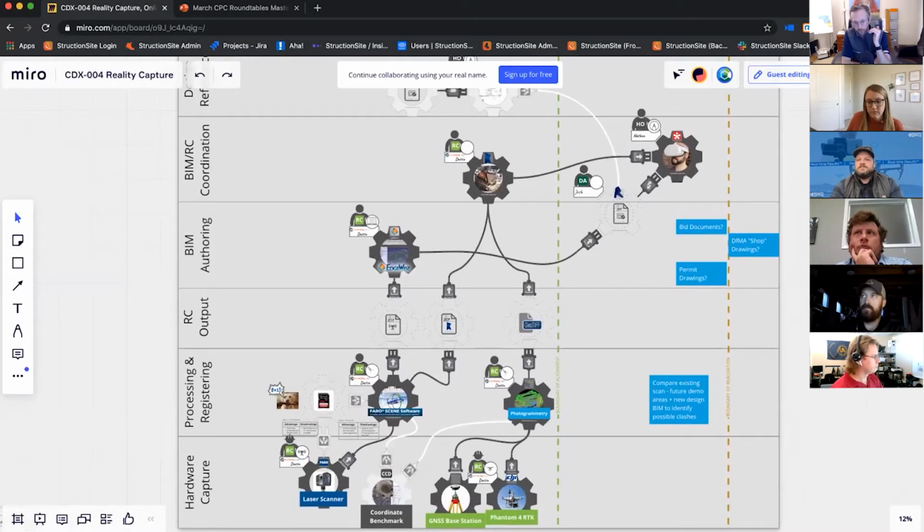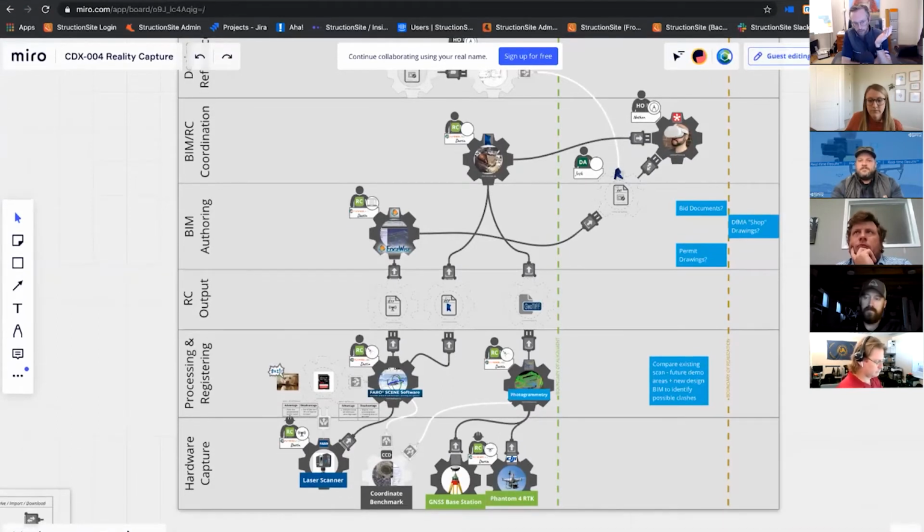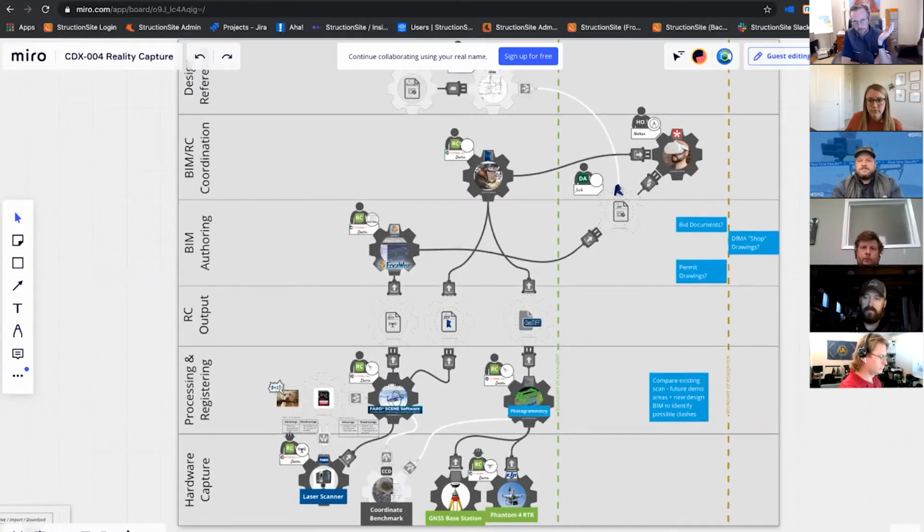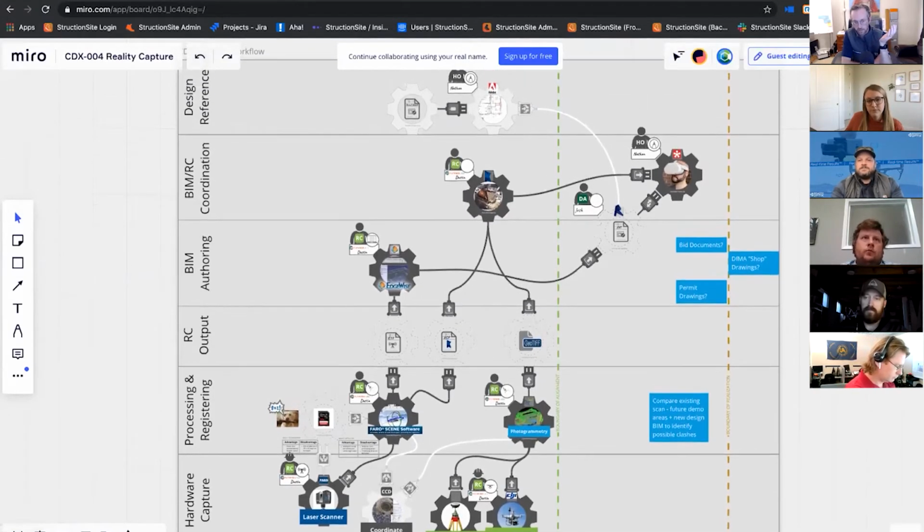So you end up with a lot of human error that's no fault of anyone's, it just happens. And to bring as much automation as you can as well, right? So while it is scanning, the registration process takes an hour after you've scanned, and 20 scans you can easily do in a morning, maybe a full day depending on the scanner. And I think of that in terms of what that would take for a lot of projects, especially residential, right? You'll have an architect go out there and measure with maybe a line laser. So you just end up with all this risk.